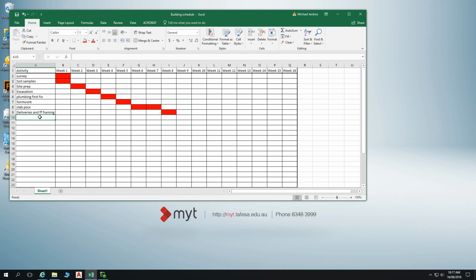So you get the roof on, and also get some insulation on the frame there as well to weatherproof things. With your first fix framing, you're putting the windows in as well at that stage. So once you've got windows, roof, and insulation on, it can hold off a decent amount of weather. Not strong winds, of course, with unprotected insulation, but it protects it all from the weather. So we've got roof.